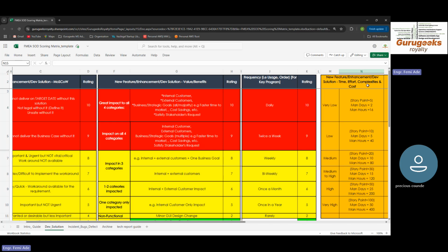That means that if somebody tells you that they'll do this work in 2 days, how many hours do we have in a day? How many hours do we have in 2 days? That's about 48 hours. So that means that the man hours is 48 hours, right? And this is like a template, so your assessment is going to be done separately on each ticket. So you write down that information on your Jira ticket.